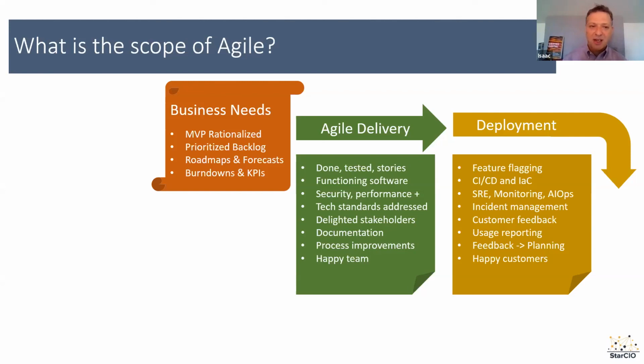And then you need to have a discussion with the business leader and say, what goes into this first release? What is minimal based on what our users are experiencing and require? That's where estimation really comes into play, because when you start getting a sense of what you can deliver in one chunk, and it's 2 sprints' worth of work, and when you add a whole bunch of new capabilities, it's 7 or 8 sprints of work, it puts that element of cost and value together onto the same playing field. And you can have a discussion about what really needs to go into the MVP.